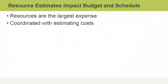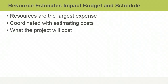However, on the other side of the coin, you need to make sure that the resources you identify are in line with what the project can afford. Usually a project starts out with a rough breakdown of the overall estimated costs. For a more accurate estimation, you need to investigate further and determine not only which resources the project needs, but also how much you need of each resource — for example, how many builders and the quantity of materials like bricks and cement for a building project. You can then estimate the costs of each resource and come up with a realistic and precise budget.